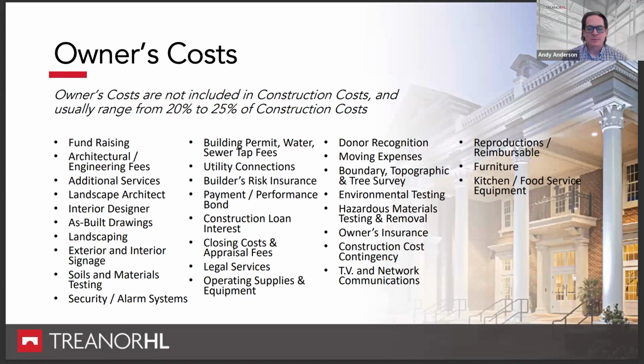Now, as the project proceeds until the day you start construction, that amount you want to hold can be reduced. From the beginning at design development, where the scope's kind of defined, but there's a lot of details and we're still months away from starting construction, you might want to hold a 10 to 15% contingency depending on the size and complexity of the project. And as you move towards the day that you're ready to break ground, and the contract has been signed and the contractor's putting the bulldozers to dig up the dirt, you're still going to want to hold at least a 3 to 5% contingency, because there's going to be something that's unforeseen.